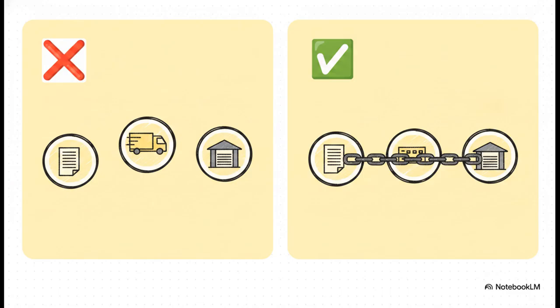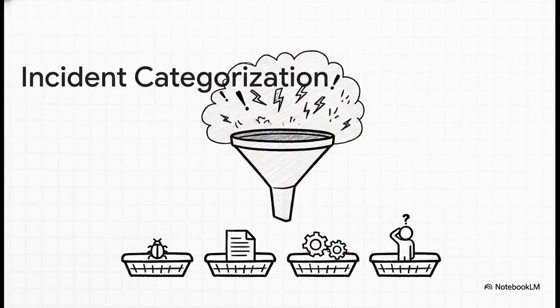Your testing governance has to mandate complete end-to-end process chains. You've got to test the entire flow, from sales order creation in SD through freight planning in TM, all the way down to physical warehouse loading in EWM. Why? Because module isolation is exactly where the most critical, project-derailing interface failures like to hide. Then you go live, you enter hypercare, and suddenly everyone is screaming that the system is broken.